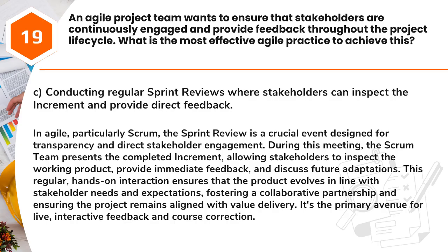Answer: C. Conducting regular sprint reviews where stakeholders can inspect the increment and provide direct feedback. In Agile, particularly Scrum, the sprint review is a crucial event designed for transparency and direct stakeholder engagement. During this meeting, the Scrum team presents the completed increment, allowing stakeholders to inspect the working product, provide immediate feedback,